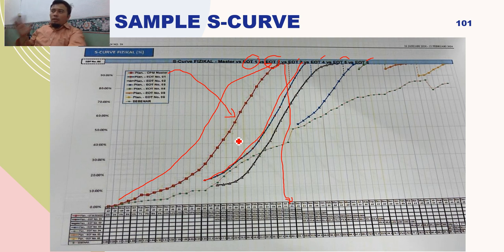What is completed is completed. For example, in this example here, the task has been completed up to here. So beyond this, the duration and the start date, the early start, can be adjusted to suit your newly granted EOT. So in EOT 1, the client will provide you more days to complete. So based on the days given, you can adjust your duration.